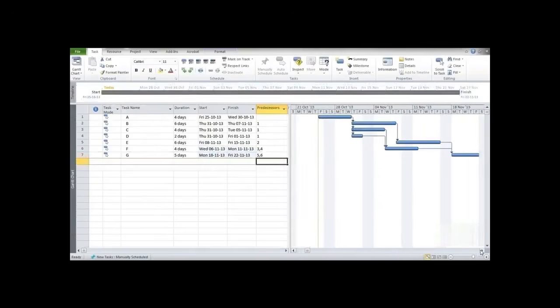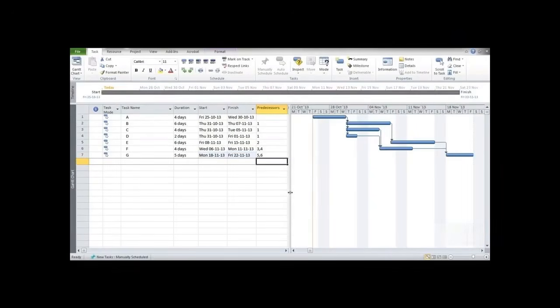So now if we want to look further, yes, we know that activity B is after activity A. If we look at the relationship, activity B, which is this one, starts once activity A is completed. So the relationship is finish to start, which means after activity A finishes, activity B starts.